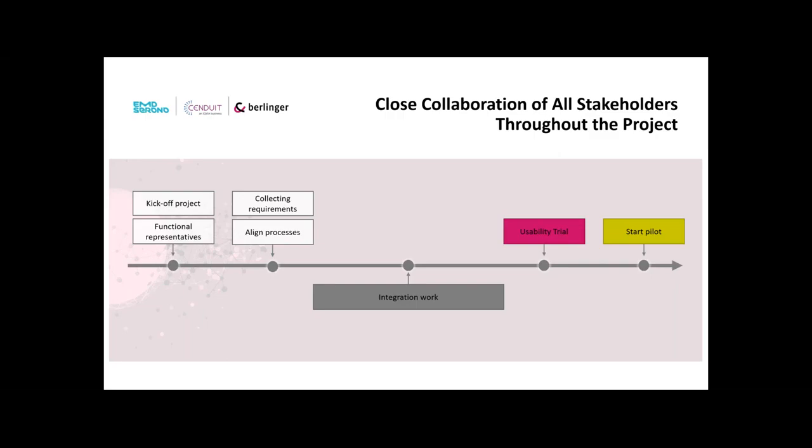What else we did is, apart from the usual user acceptance test that's done in most of the studies involving IRTs, we also did something like a usability trial. So we had aligned those processes, we collected all those requirements, we did the integration work between the software systems, but then we also did a usability trial to basically test the whole process and test the technical integration.